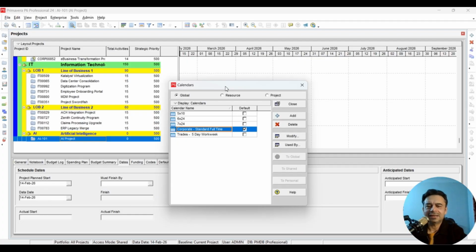All in all, there will be like 10 days off. So in fact, if you look at the calendar, your actual days will be like 40 or 41 depending on the settings of your calendar, but the actual working days will be 30. So settings in the calendar, working and non-working days, directly impact the total project duration, the length of the project.